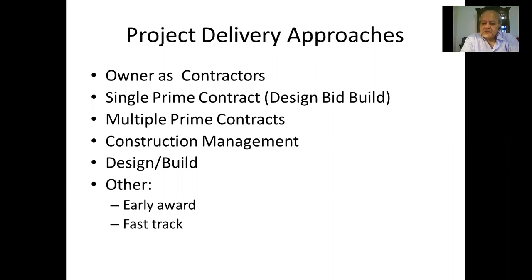They submit their bids, and then you select one of them based on price, or based on qualifications, or based on criteria. Sometimes we ask them to provide their CVs, their technical background, their manpower, to make sure that they can do this project. So this is the traditional way of project delivery: design, bid, build.